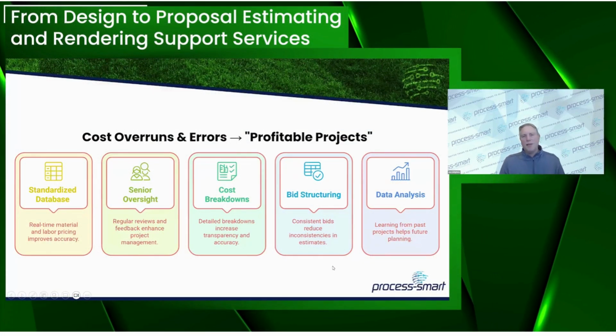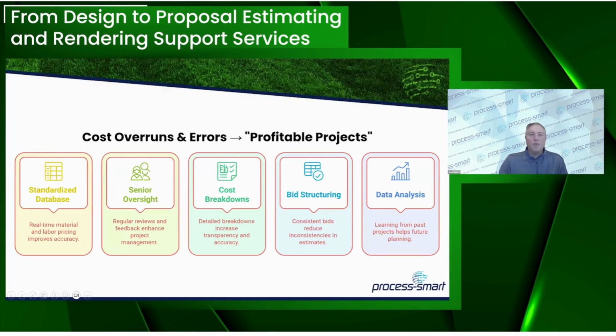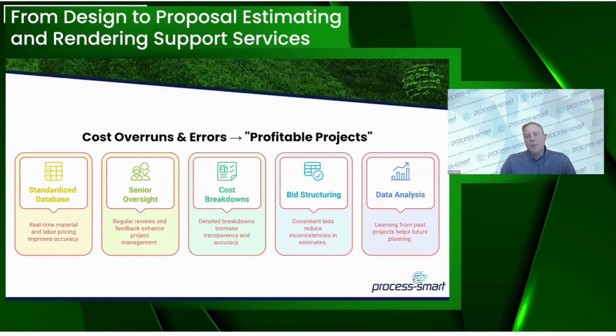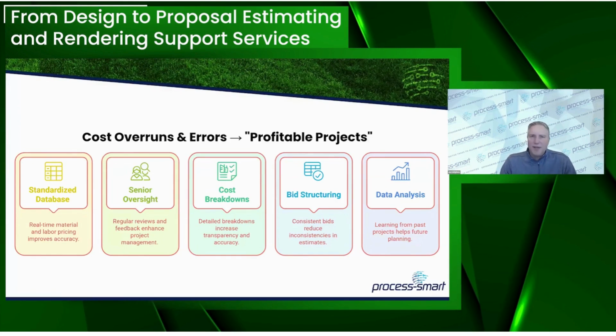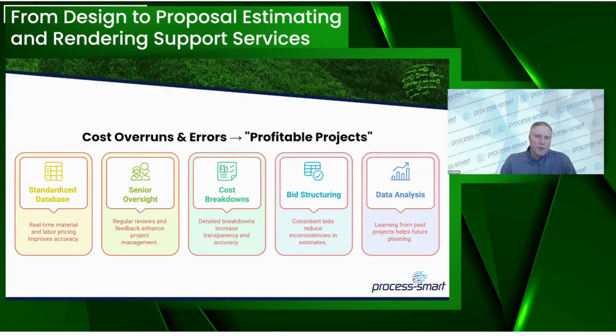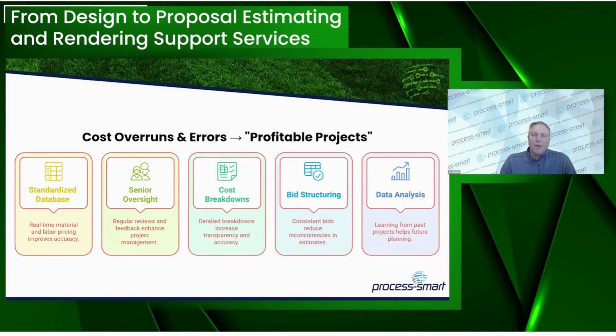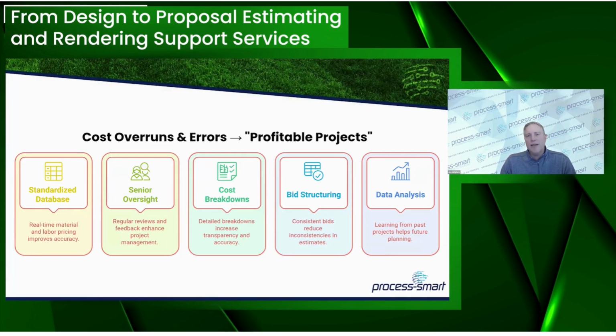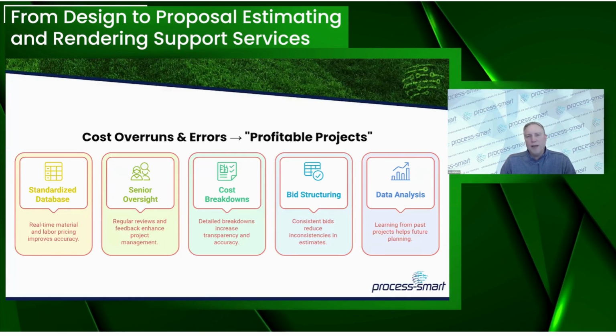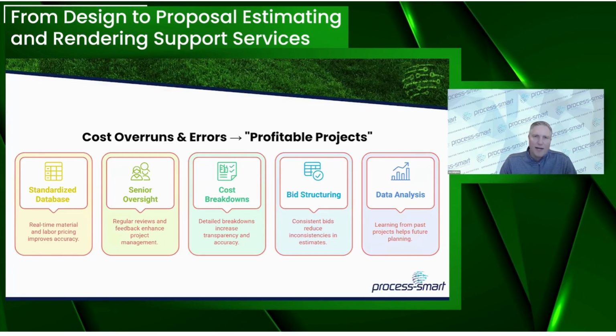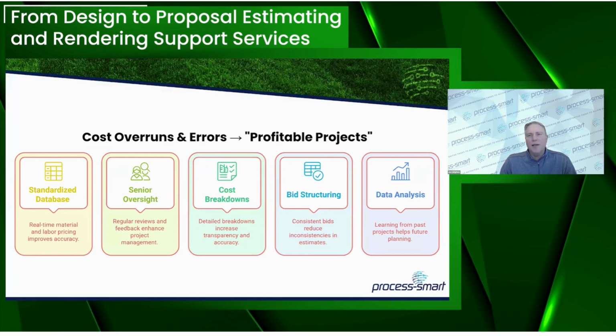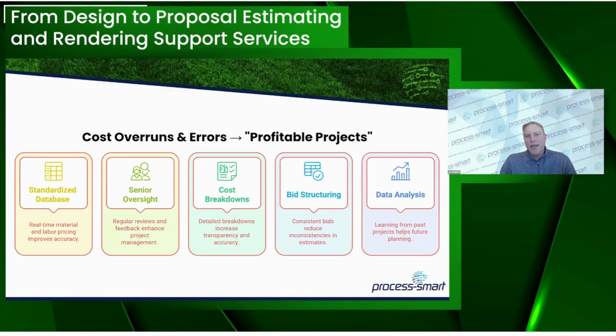Cost overruns. This is obviously one that's really painful. You come up with a proposal, maybe it's at a 55% gross margin. Then as you go to source these materials, the type of plant that you spec'd in isn't available, or it's available but not direct from a nursery. You have to get it from a broker, and so you're paying extra costs.